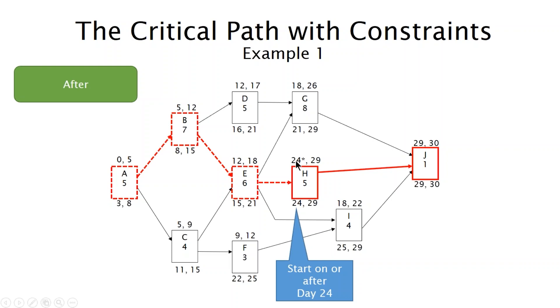So the critical, what you might see in the scheduling software, I'm going to say might because sometimes I don't know exactly, and mysterious things have been known to come up. But what you should see is that there is a critical path from H to J. And actually these activities A, B, E, no longer are critical. That's why I made them dotted. They wouldn't be critical because they would have total float now. They would have available total float. So that's one of the challenges of working with constraints. You need to be aware how you can edit and change your critical path.